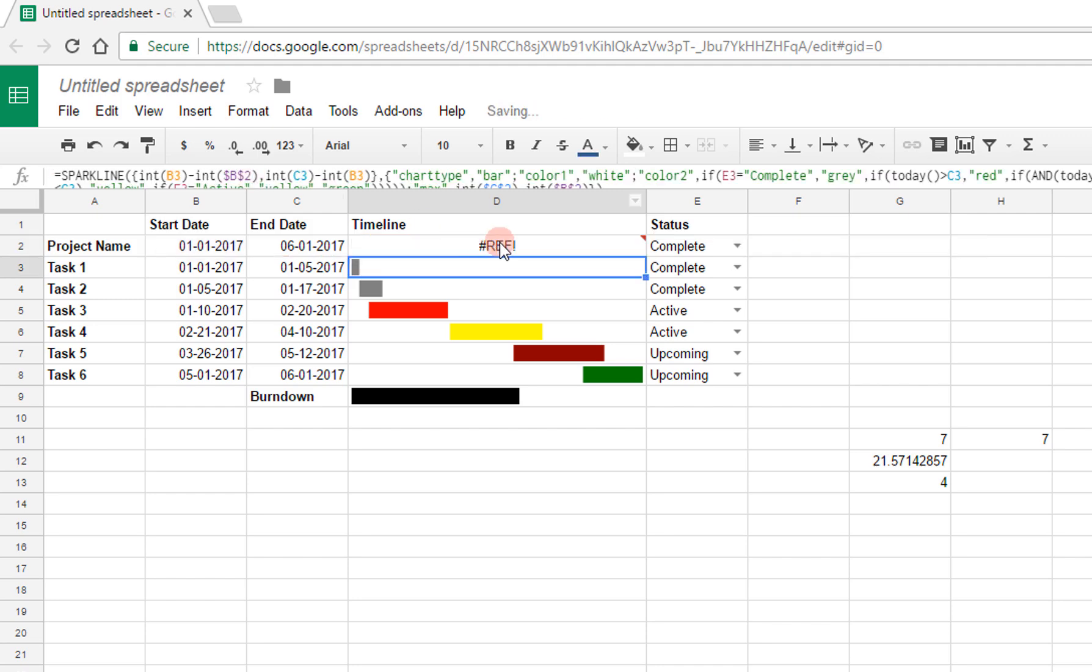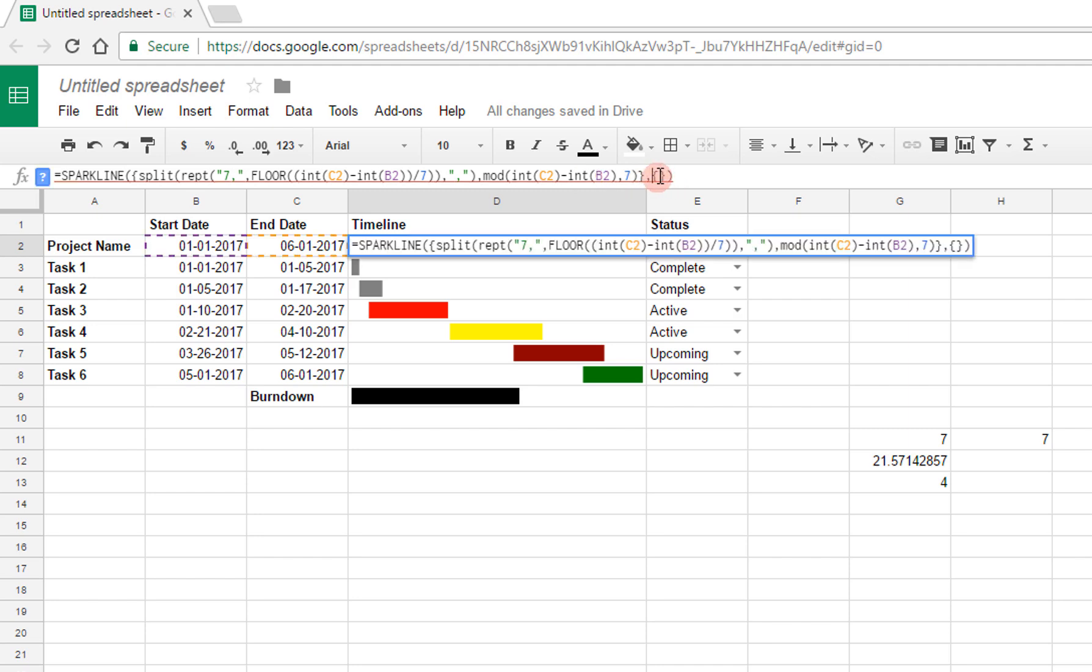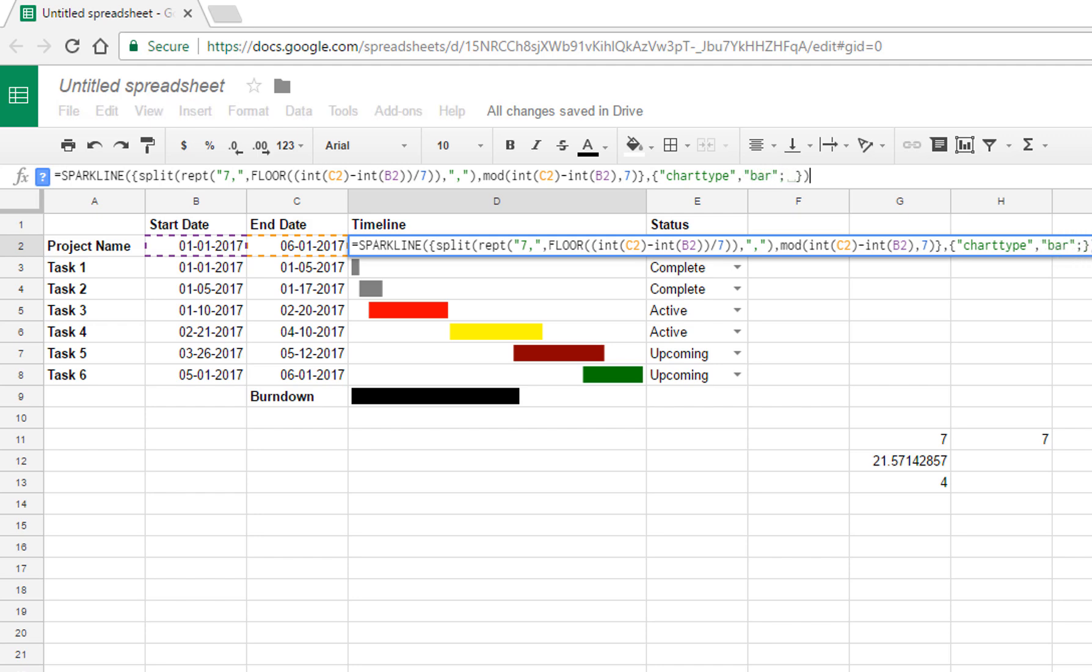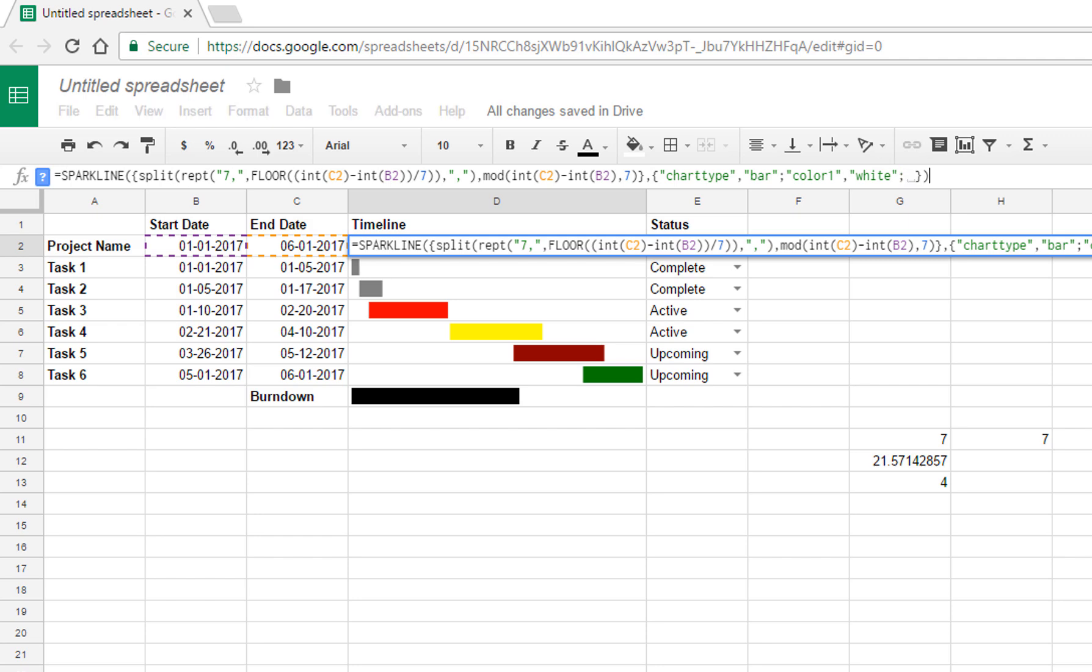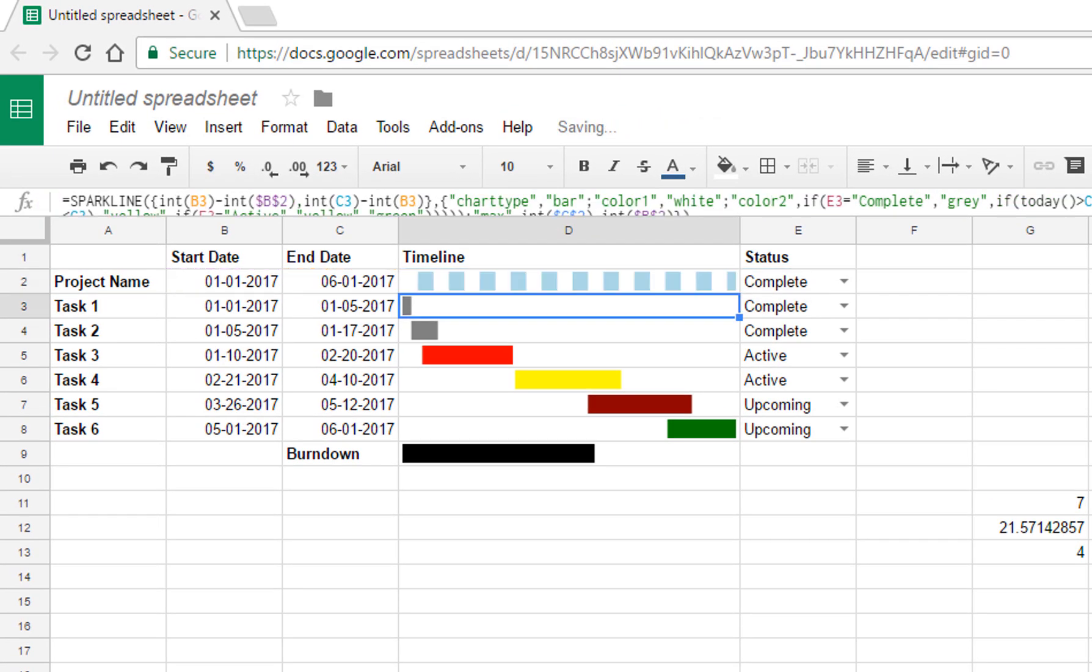Okay, so now I have that data over here. Of course it doesn't plot anything yet, because there is no specification here. And so then I'm just going to make this another bar chart, where the first color is going to be white, but again, you can change this, and the second color is going to be light blue. And now if I hit enter, you see what I'm going to get. This is going to split that timeline into these blocks of length 7, each one for a week, except for the last one, which is going to be the remainder for the duration of days.